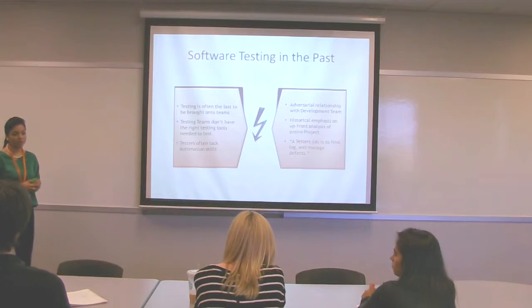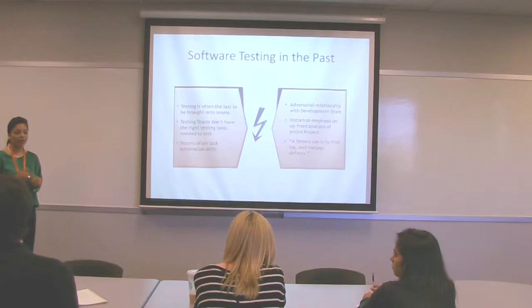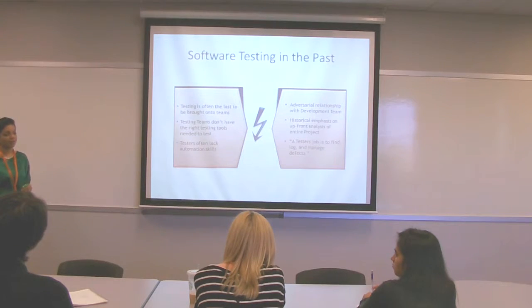Let's have a deployment on Wednesday, the very first week in a 2-week cycle, and then Tuesday the next week. The idea is to break it into even smaller chunks, and then eventually after having 3 cycles, they're like, okay, let's not have any cycle. If I have my story done, I'll check it in and I'll let QA know, and QA will be able to test it.